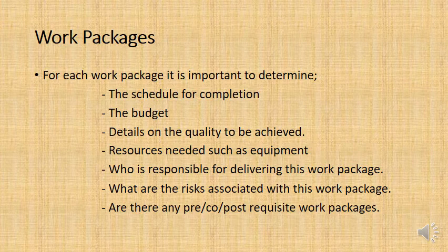Likewise, you need to have done statics in order to do the structural engineering modules. Those are prerequisites. You can also have postrequisites, which go in the other direction, and co-requisites, which means this work package, you must be doing it alongside another work package. They've got to be happening simultaneously.